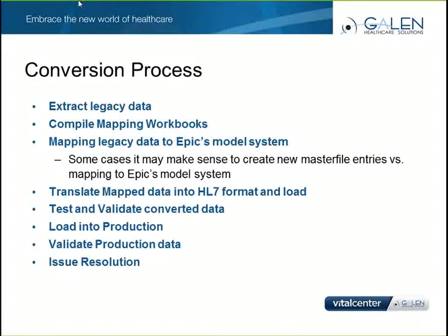For groups that are converting medications, we've heard that it's very beneficial to have a pharmacist available who can assist with any medication conversion questions and to also participate and provide final sign-off for the converted medications. Then bring your providers in who are more familiar with the clinical data.